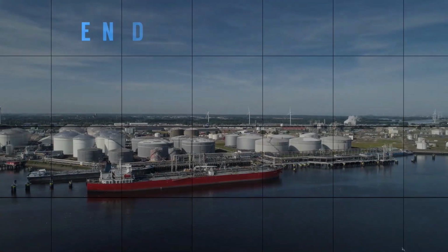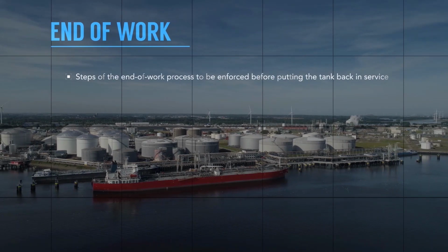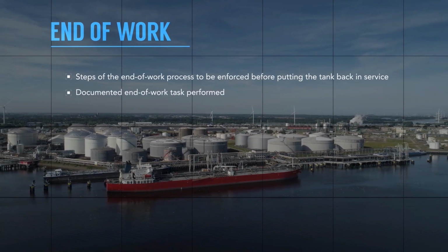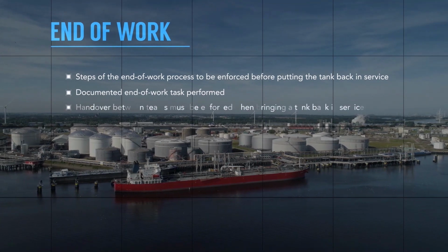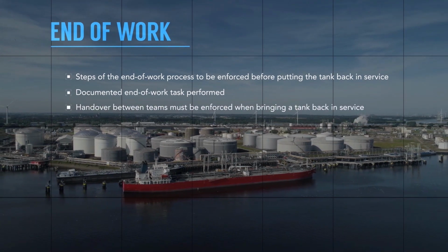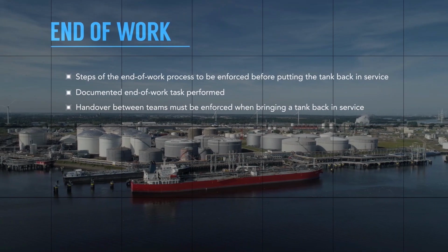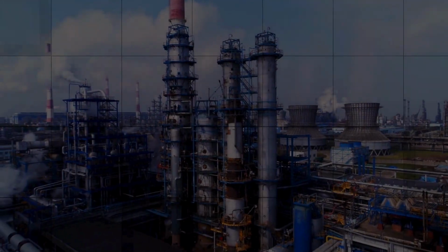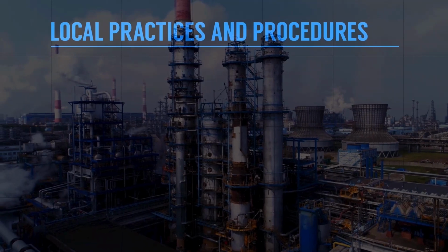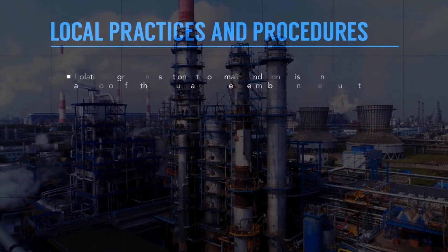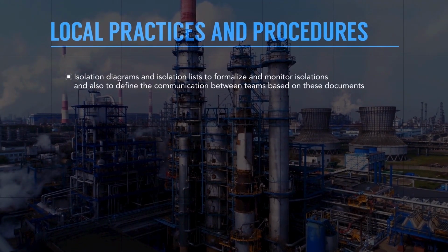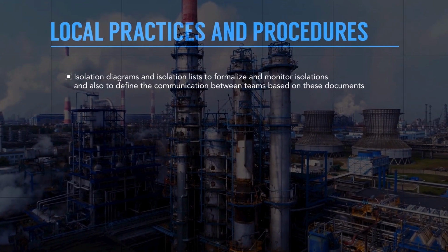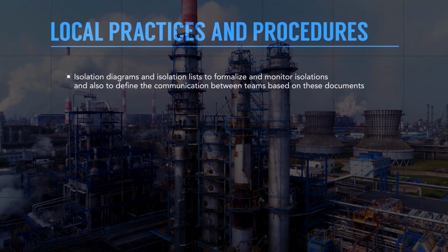End of work. Steps of the end of work process to be enforced before putting the tank back in service. Documented end of work task performed. Handover between teams must be enforced when bringing a tank back into service. In local practices and procedures, the use of isolation diagrams and isolation lists to formalize and monitor isolations and also to define the communication between teams based on these documents.